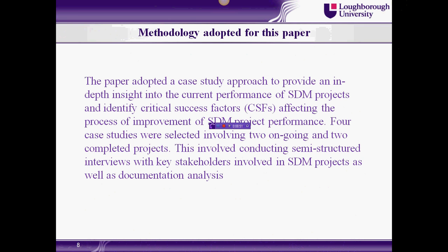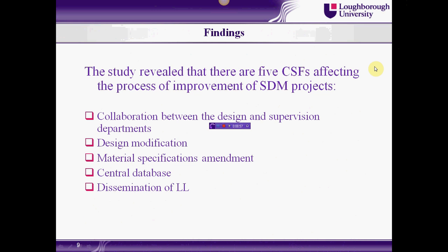Findings. The study revealed that there are five critical success factors affecting the process of improvement of SDM projects. Collaboration: the need for collaboration between the design and supervision departments. The study revealed that there is a serious gap between these departments.